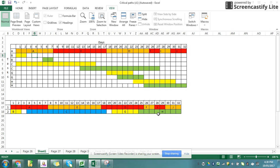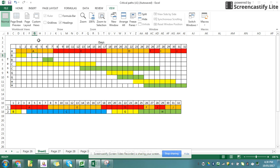Also, you need to schedule when someone's going to come in. So if I was asked when could someone come in and see at least three tasks, in this one, there's never a chance because I only need to ever have two tasks going on at any one time. But if you couldn't quite fit it in, then you'd have to schedule a time when you could have three tasks going on at any time. But remember, that is the end of week four. So over here would be week five. And you've got to be careful about that part when we get to it. Okay, so that's a Gantt diagram.